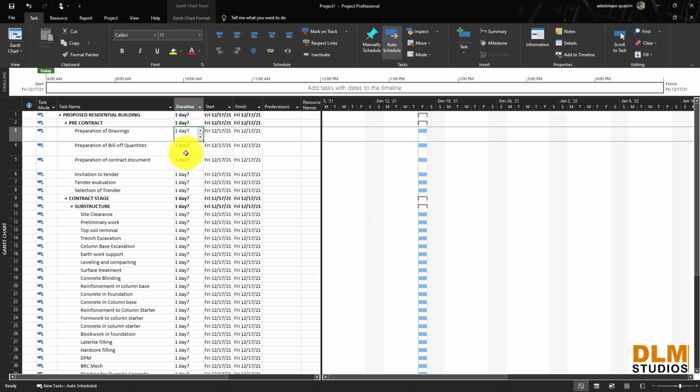Now if you have a project of maybe 300 meters square of block work, and one person is covering 10 meters square in 8 hours, how long will it take for 300 meters square?